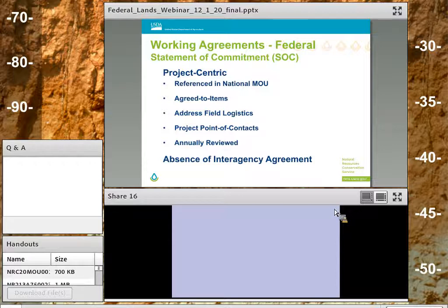Or if there's wilderness or permitting involved, or we're somehow reliant on PAC support, that can be addressed here. If the partner is going to dedicate in-kind services or can add some seasonal staff to support project work, that can be documented here. If there are some specific expectations from the partner on roles and quality control, this is the place for those expectations to be expressed.